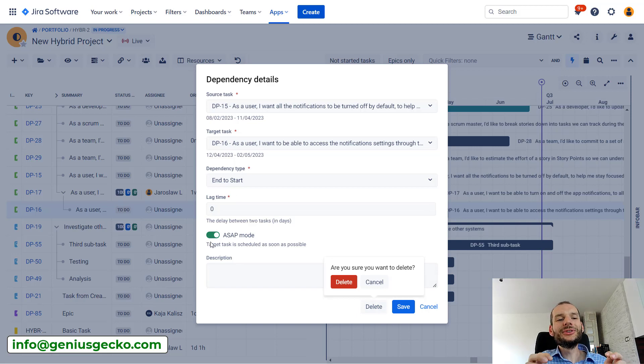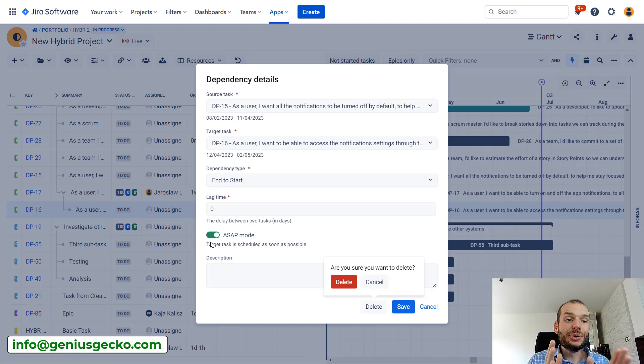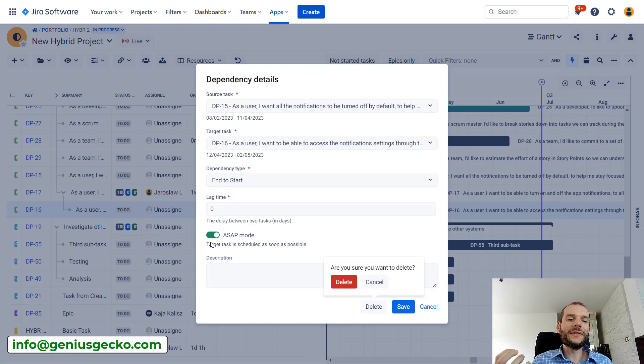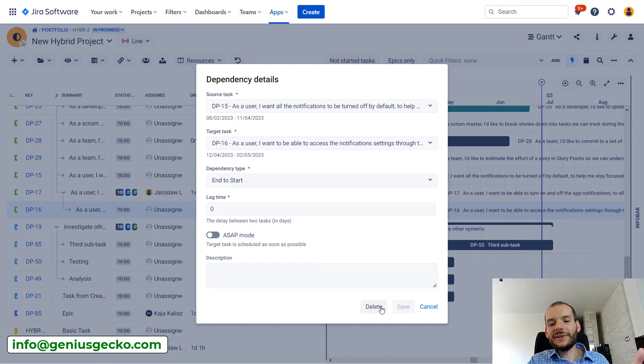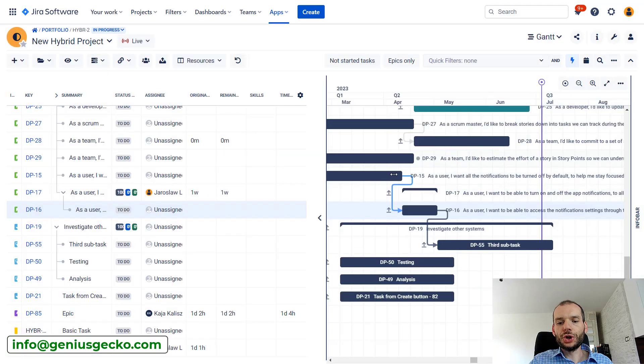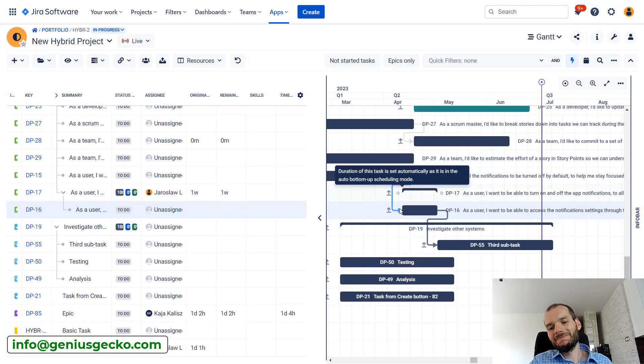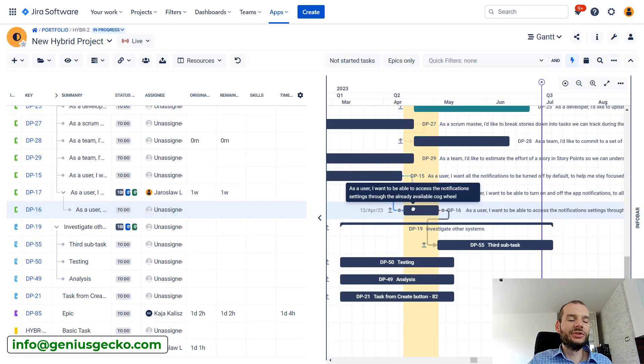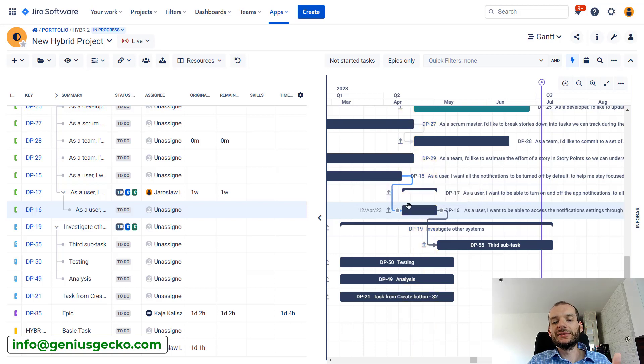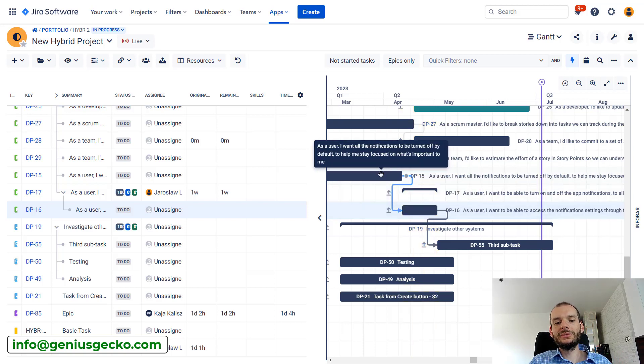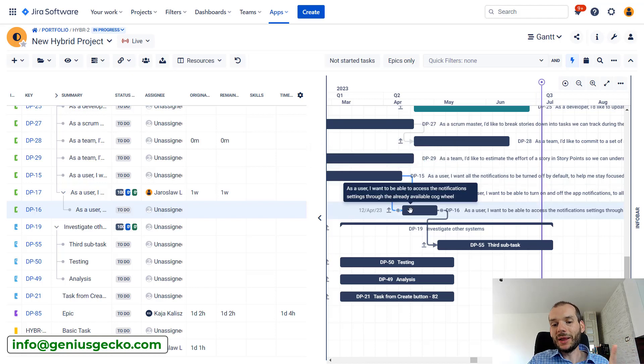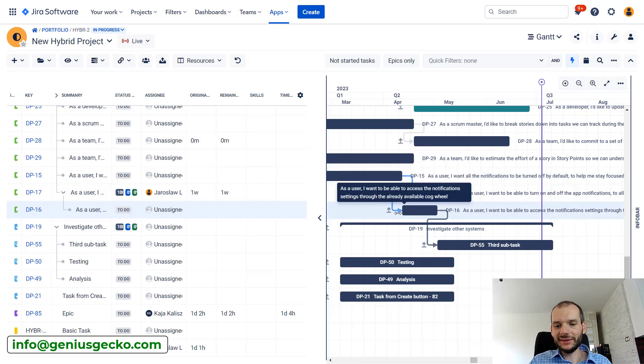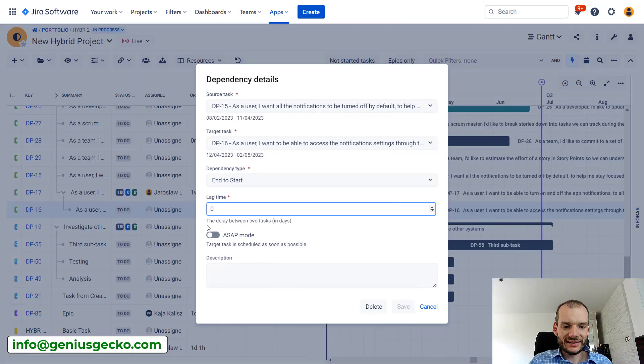We may not be able to deliver our plan because of these delays. If we address and deliver tasks that can be delivered earlier right away, it can help us get some more room to compensate for possible future delays. So depending on what is your planning style - maybe you're not even keeping track of resources in Big Picture - you need to be aware what are the consequences of having ASAP mode and act based on that.